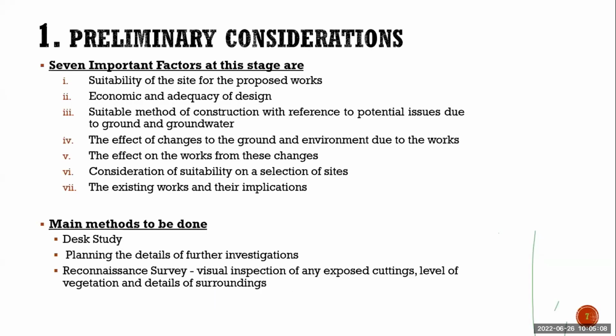So, in the preliminary considerations, generally we will see the suitability of the site for the proposed work. Like I have already mentioned, can we do the construction here or not? That will be decided. Then, will it be expensive or will it be within our budget? Okay, the economical perspective. Then, are there any potential issues? We have to see that before we perform any ground investigation.